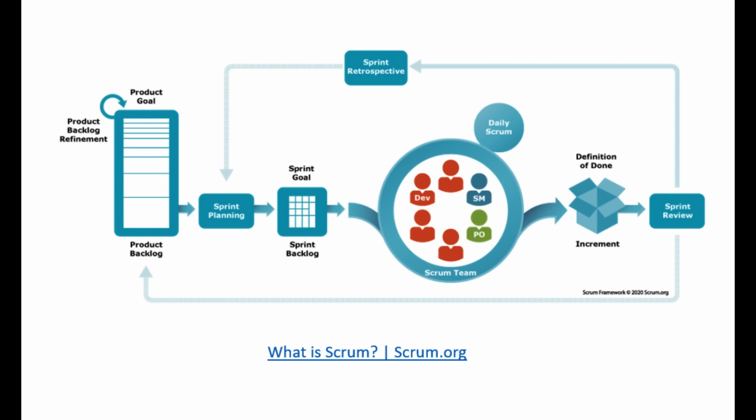Please note that ideally, every sprint should have a goal which is normally associated with achieving the product increment planned for the sprint. Every day during the Scrum, the team meets for a short period of time, for example 15 minutes. These short meetings are called daily stand-ups. The purpose of the daily stand-ups is for the team members to update each other.